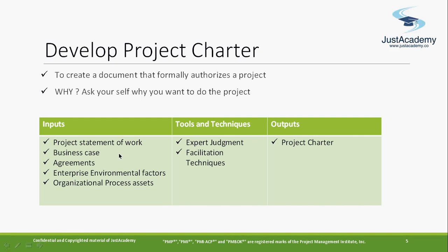For example, the project charter is the first official document which the project sponsor or business sponsor gives to the project manager to start the project. Until the project manager receives the project charter, he can't start the project. He can't work on resource onboarding, collecting requirements, anything. That's the first document. And in the exam, they will ask at least 1 or 2 questions from this concept itself. Remember that the project charter authorizes the project manager to start the project.